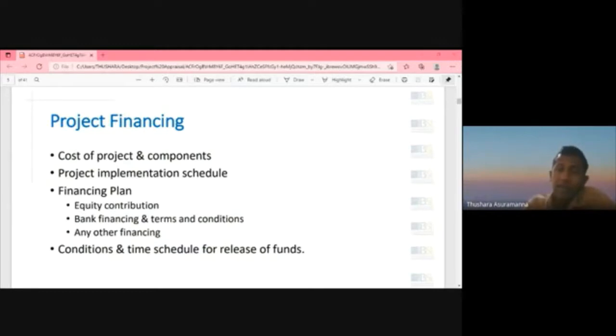Or maybe sometimes the client says land costs this much, but there may be other related costs to be added to that. Maybe land development, fencing, clearing. There may be some other costs also. The client may not know that, but you need to discuss with the client and put that into the project cost computation. Otherwise, the client can say, I will purchase it, total is 8 million. So that's the cost for the land.